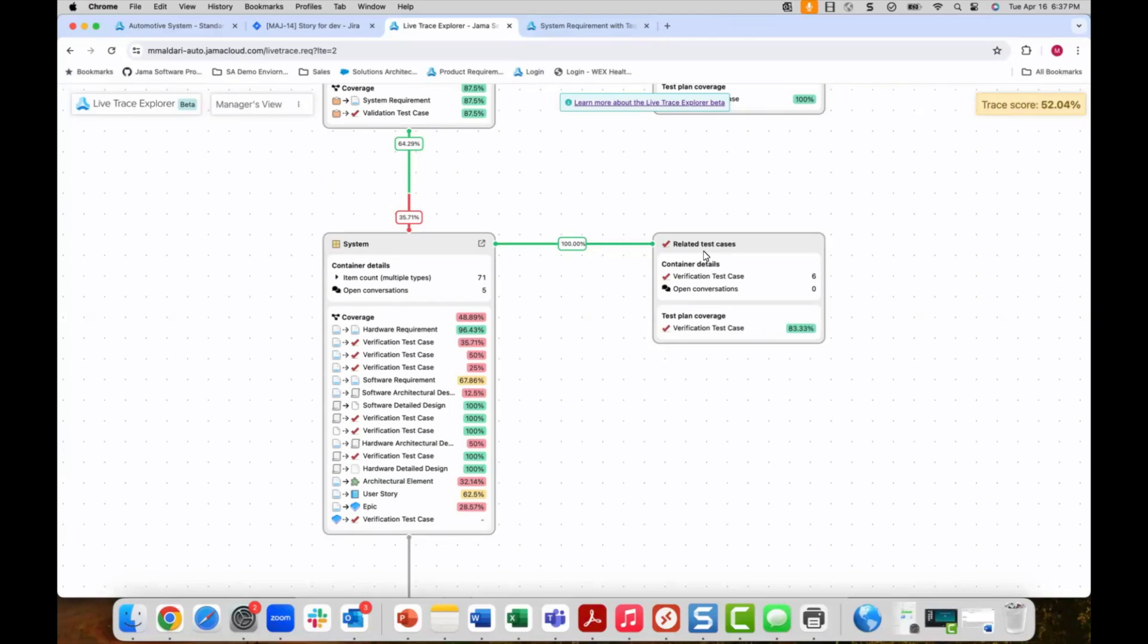How do I know which product requirements have been missed? This is tracked in the live trace explorer as percentage of coverage between linkages.